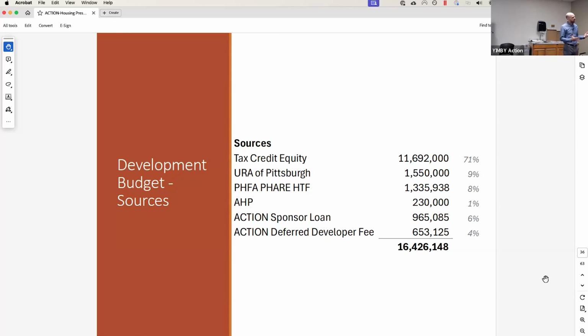And in this case, we had some big cost overruns due to some unforeseen environmental issues, as well as COVID, et cetera, et cetera. So we put in a sponsor loan, which basically just means Action Housing is committing its own money. I should also say, when we say loans, these are not really loans that ever get paid back. So they're soft loans. The intention is that they're going to stay there because, again, the projects don't have cash flow to pay these back.